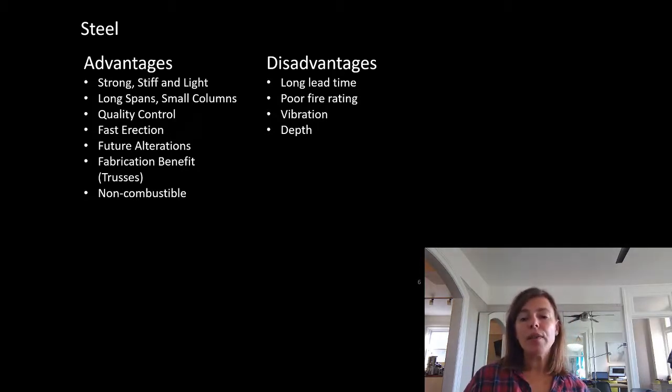And then you have a team of specialists who are usually erecting it and installing it on site. There is a second set of engineering eyes that looks at steel in the shop drawing phase. So the engineer creates their drawings, the base building drawings with the steel on it. But then the fabricator, at least here in Ontario, this is different in BC and California, the contractor's engineer, the fabricator's engineer, will design the connections. But that means there's two sets of engineering eyes looking at everything.